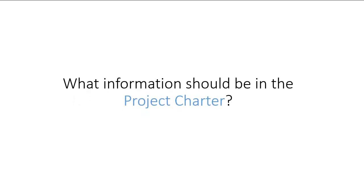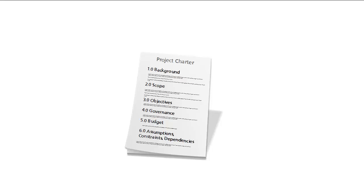Now let's talk about the various pieces of information that you put into a project charter. First, I would put a section that gives background information. List anything a person would need to know in order to understand why the project is such a good idea.